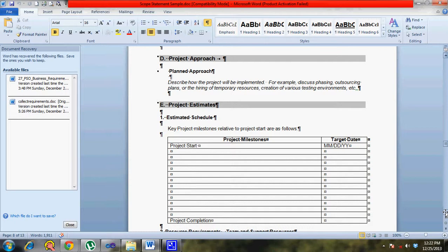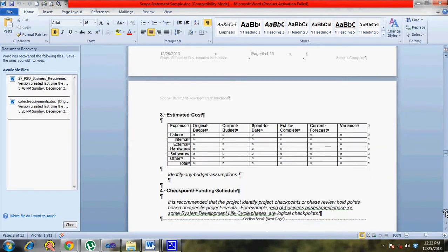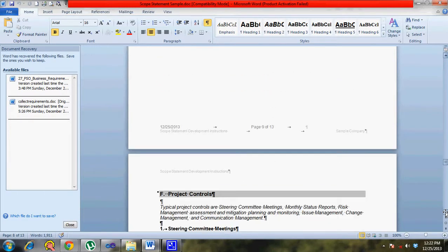You also talk about the product scope as well as the project scope. The product scope tells what the characteristics, features, and functionalities of the product are. The project scope deals with the phases, what the deliverable for each phase would be, and things like that. So that's about the Define Scope process, which deals with the creation of your scope statement.